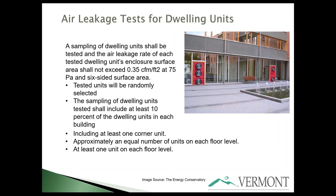Regardless of how you test your exterior air barrier, there is now also a requirement for dwelling units. In multi-family buildings or dormitories, a sample of units must be blower door tested and must meet 0.35 CFM per square foot at 75 Pascals using six-sided surface area. The contractor will not know which units are selected — testing is random. You must include at least 10% of dwelling units in each building, at least one corner unit, and approximately one unit per floor level.